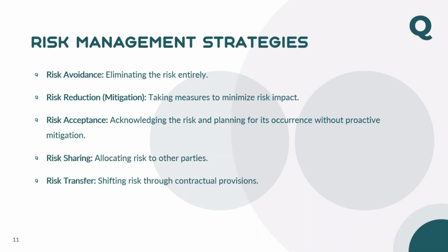So what you do, you will wisely choose the Incoterms. So the supplier's responsibility will be up to here only. What do you call that? Up to port. From the port, the responsibility will be handed over to the employer, maybe as a material offset, onsite, whatever you call.